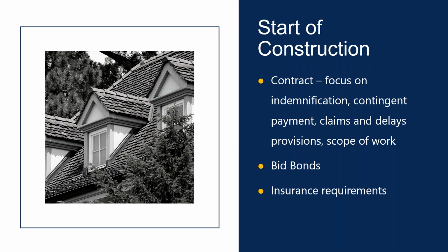Anything that governs how you're going to submit for extra work or submit a claim, seek delays, whatever it might be, you need to go make sure that you're paying attention to those documents. During COVID-19, we have had a plethora of delay claims. And what's tough is a lot of times contractors don't pay attention, and they see that they're entitled to additional time, but they don't read the part that says that they're not entitled to additional costs for delay. That's known as a no damages for delay clause.